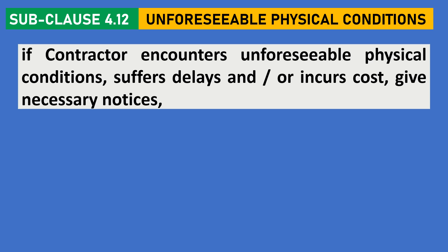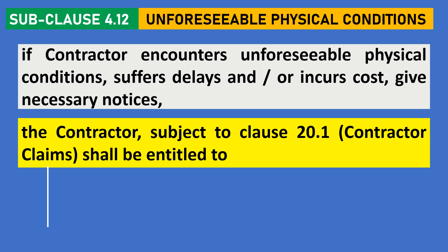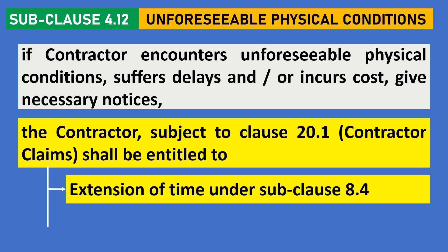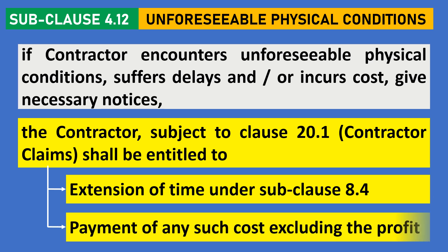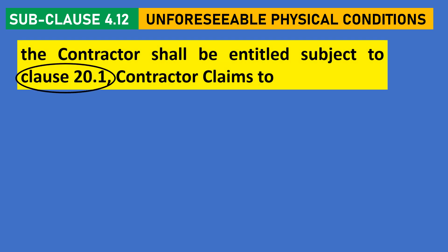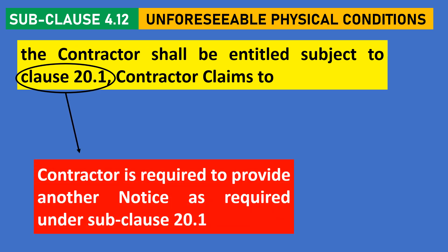If the contractor encounters unforeseeable physical conditions, suffers delays and/or incurs cost, and gives the necessary notifications, the contractor - subject to subclause 20.1 - shall be entitled to an extension of time under subclause 8.4 and payment of any such cost, excluding profit. Since the reference of subclause 20.1 has been provided, the contractor is required to provide another notice as required under subclause 20.1.